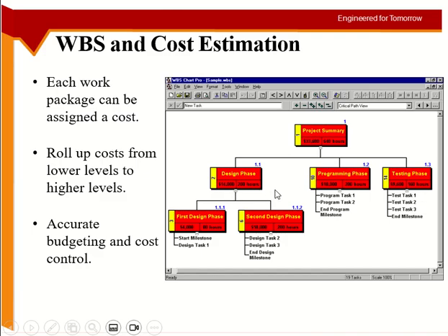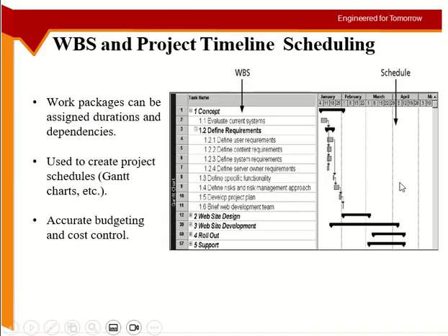But I told you duration is not a simple summation. So this one is a more accurate representation of duration, the timeline. The reason you can see over here: this activity and this activity and this activity and this one, all of them are starting together. 4 different activities starting together. And this one finishes in maybe 2 weeks or something.